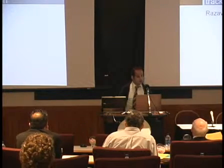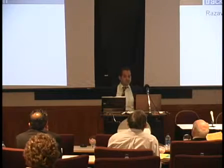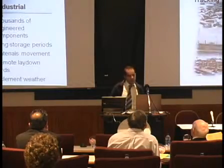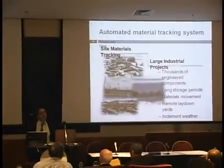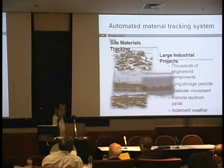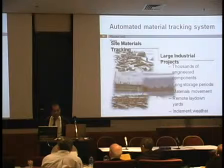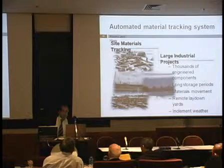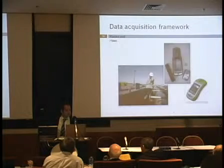In another related application, a researcher has developed a data fusion model for on-site materials tracking in construction. There are thousands of components in the construction site. Statistics show that around 10% of materials cannot be found when they are needed, and up to probably 80% of the time. These motivations, along with some other challenges like long storage periods, materials movements, motivated the researcher to design a site materials tracking system.